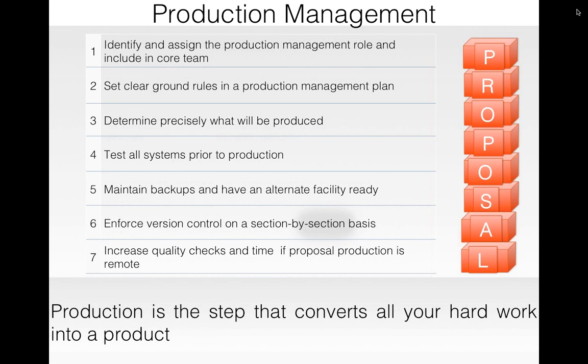And if your proposal has to be printed remotely, that is, you are creating the proposal here and it has to be printed on site offshore, in that case you need to revisit your proposal timeline, and you have to do more quality checks, because once the proposal is gone from your side, you will not have any control on the proposal. Even if you identify some mistakes, you will not be able to make those changes.